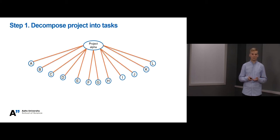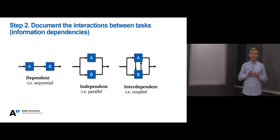In this example an imaginary project called project alpha has been decomposed into tasks running from A to L. In total this project has 12 different tasks that need to be executed to complete the project. Next we need to document the different interactions between the tasks. Here you find examples of the basic interactions that any two tasks can have. In the first example on left, task B is dependent on the information produced by task A before it can be completed. This means that tasks A and B are sequenced.